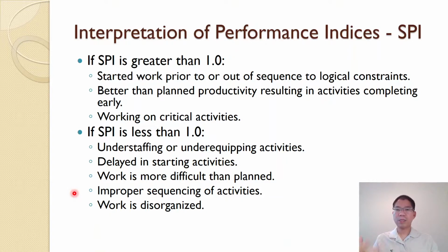So we tend to be optimistic in estimating the progress, and when we get out, we face the weather, the rock, things like that, or improper sequencing of activities. Work out of sequence will reduce productivity and then the project time. Work is disorganized, not good planning. It's not good for anything, including the project schedule. And that's why we learn this class. And it's beneficial for any kind of major, any kind of practices that you do in the future of your career, engineering, consulting, construction, etc.